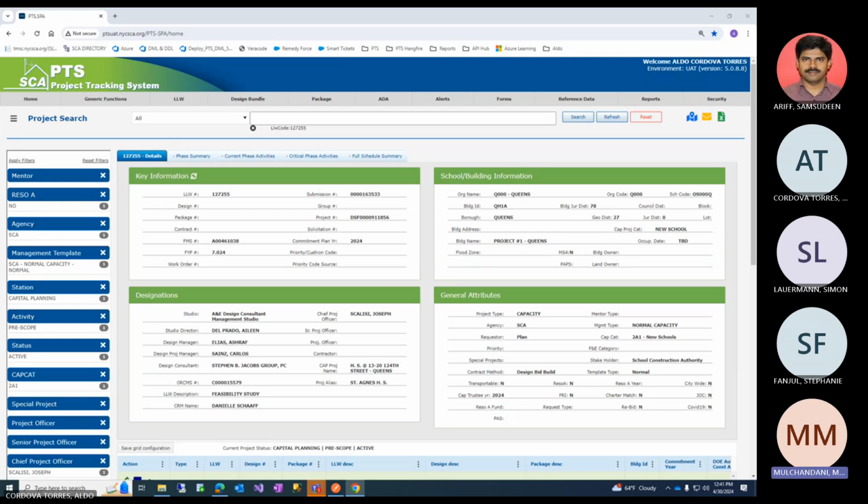And every project doesn't go through A&E. The emergency projects, that's a different management template, which is a subset, as I told, that goes from project controls directly to construction. It doesn't go through design and everything. So it's a quick fix kind of project for any emergency work that has to be done. It doesn't go through all the stages of the project. Other departments or stages like bid and award and everything are bypassed and construction is started directly on them.